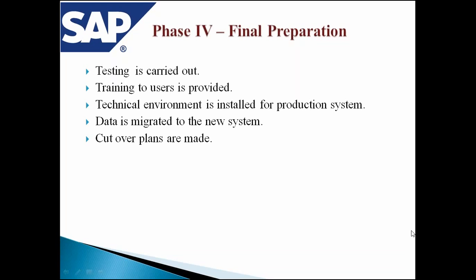Now we also prepare the user training manuals to provide training to the users according to their job role clarity, and we come up with a technical environment installed, so that if there are any issues at the table level, the developer, that is the mapper, will provide support for the technical issues. Data is migrated to the new system, and there we make the cutover plans.